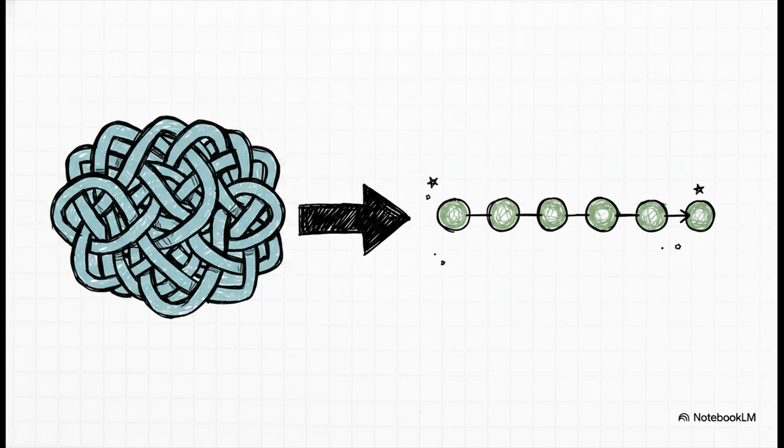Instead, getting to that future state workflow requires highly structured value stream plans. You've got to divide the implementation into distinct, manageable segments, which we often call loops. For example, you might tackle a pacemaker loop first, because that dictates the rhythm of your entire production process, and then optimize your upstream supplier loops later. By fracturing a massive, scary transformation into these highly tactical, isolated projects, the impossible suddenly becomes entirely achievable. You isolate your risk, and you guarantee progressive wins.